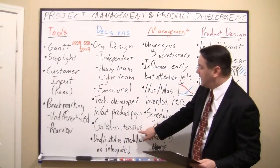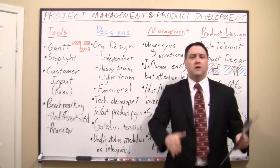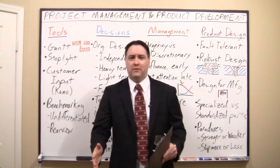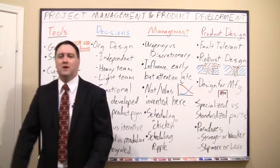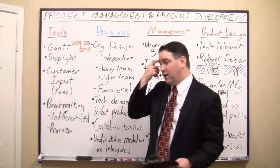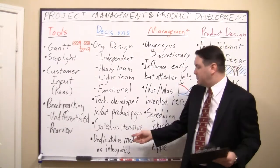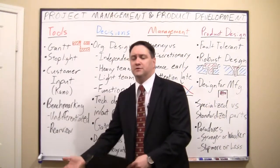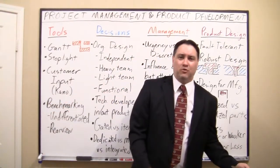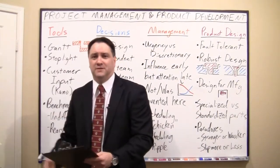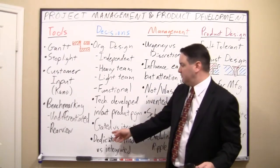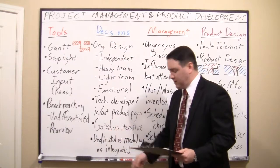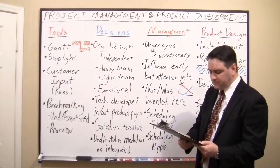The next decision is a gated process versus an iterative process. A gated process is highly sequential: design passes a gate, then you build prototypes, then tooling, then manufacturing. Software typically uses an iterative process — like beta testing, releasing to users, collecting crash reports, and patching. However, you can't use an iterative approach for airplanes; Boeing can't build planes, see why they crash, and fix them later. The more critical and life-safety-related a product is, the more a gated process is required.